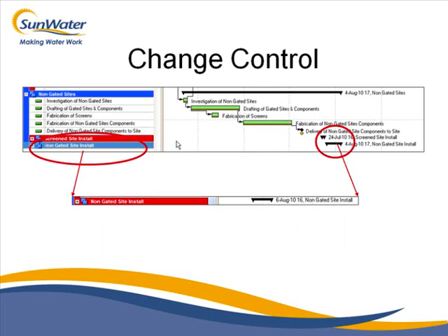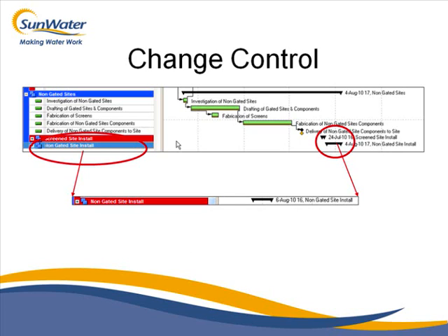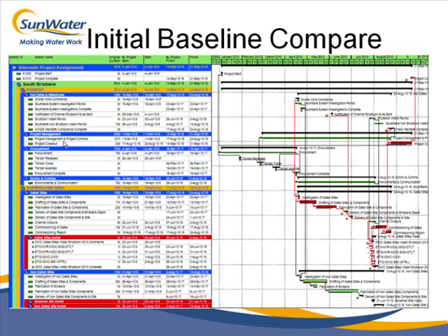It pushes it out an extra 2 days. Because as you can see, these are again 3 activities, start to start. 1 day to do 3, so therefore it's blown out by 2 days. It being on the green path, it's not the critical path. And as we can see, down here, it's been blown out by 2 days and it still remains red. So this is still our critical path, so this is alright.